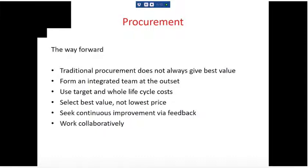Again, about last year, when Feilden Clegg Bradley Studios gave a lecture about their Worcester library, they talked about involving Arup, the environmental engineers, week one, because that's a very clever building. It's the one with the big conical copper-clad shapes, and the way those cones work is they have a double skin, and the air filters through the double skin and then gets sucked out by stack effect ventilation or by low pressure as the air blows past. In order to make that work, they involved Arup week one. They wouldn't have got off the starting blocks if they hadn't done that, and they openly admit that.